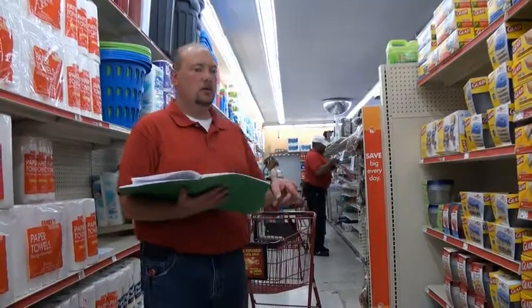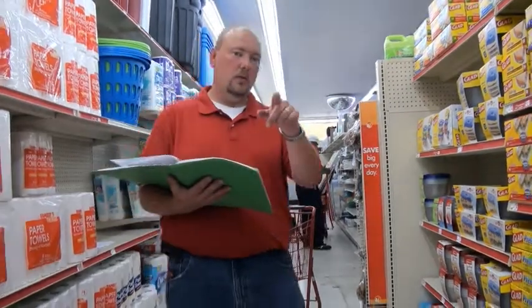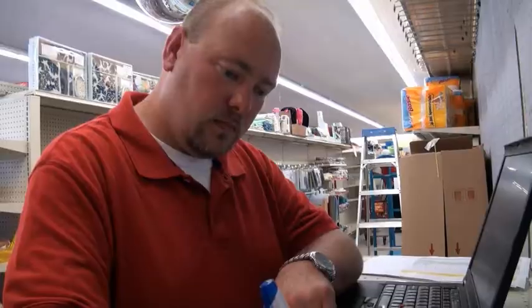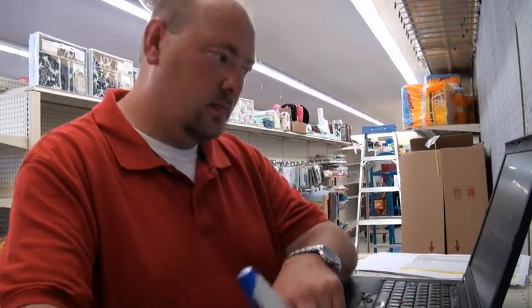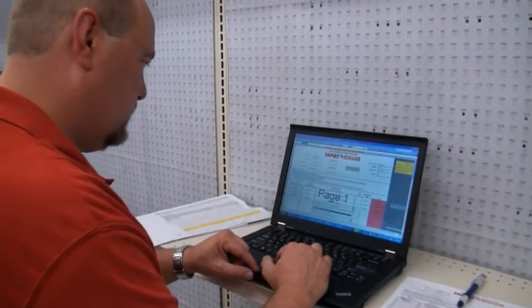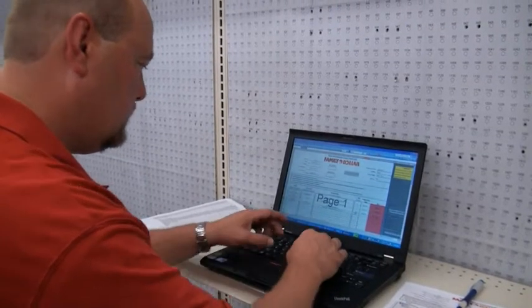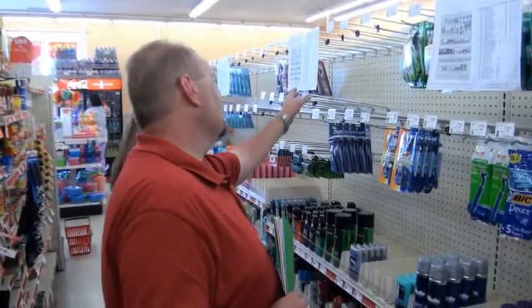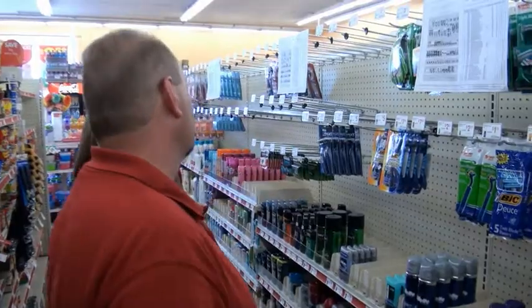In addition to validating the contents of the trailers, you should walk the store with the order breakdown reports to ensure all needed components have been received. Any discrepancies must be reported on the Daily Needs Report immediately to ensure any missing items are ordered and received in a timely manner. Once you have completed your pre-project work, you are ready to move on to the active phase of the project.